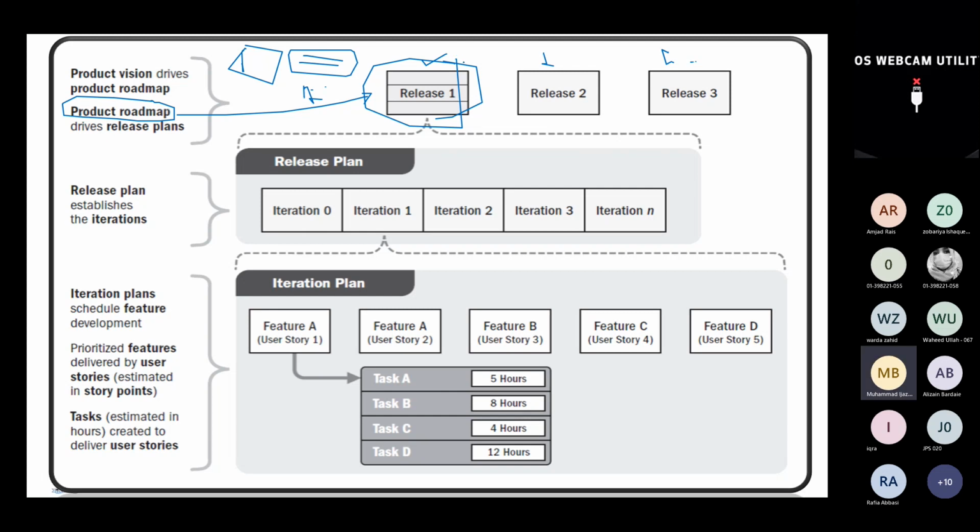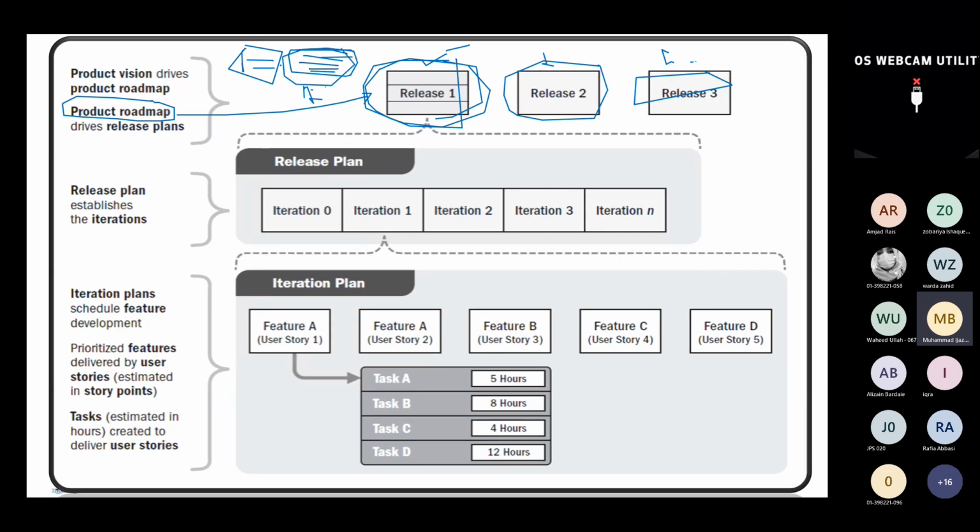So we say that some of the features of the first month plan in the product roadmap, from those, I will try to deliver the first few features in the first release within 2 months. Then during the next 2 months, I will add the remaining features. And then in the third release, I'll deliver all the features according to the roadmap plan, the complete delivery that I wanted.